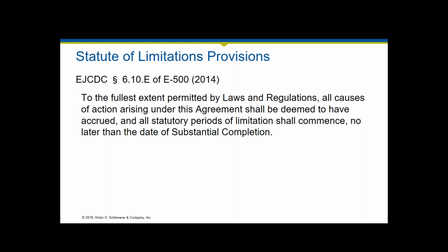This is very protective of you as a design firm, because you know that after a certain amount of time after substantial completion, the ability of the client to come after you is limited. And this provides you with great certainty, because if that statute of limitations has run out, you can oftentimes get the claim dismissed against you with a motion for summary judgment by saying, hey, the statute of limitations has expired, all claims against me are barred because it has occurred.